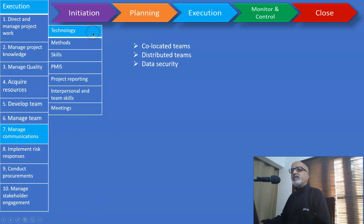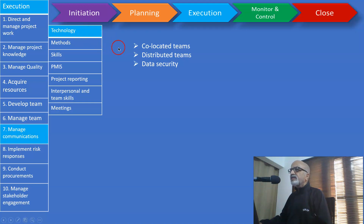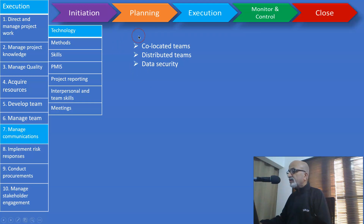Communication technology selection is very important for effective communication. Factors deciding on technology selection include whether the team is co-located or distributed, data security, access rights, and of course cost. All these parameters will impact your technology selection for communication.